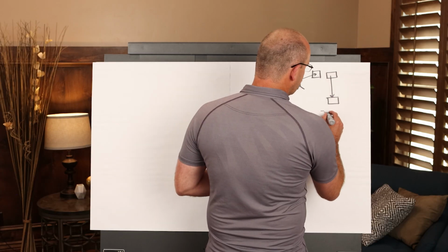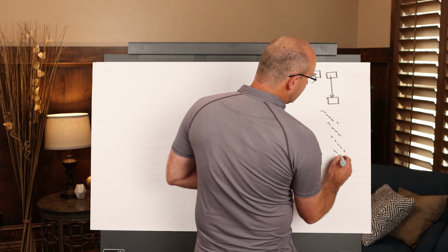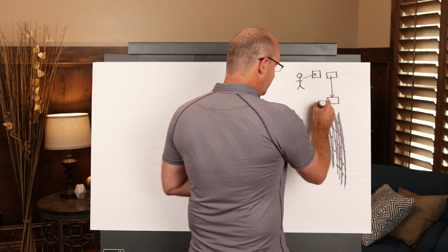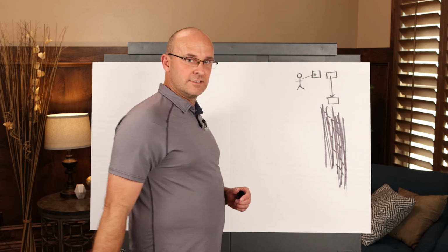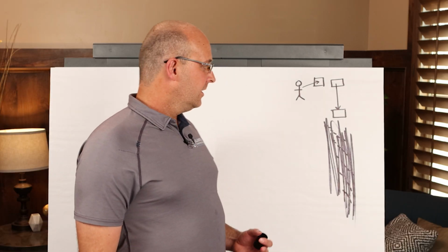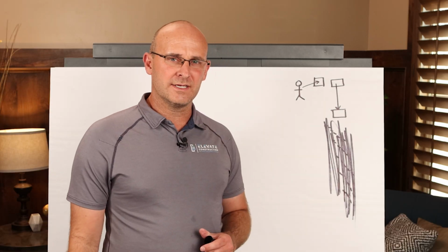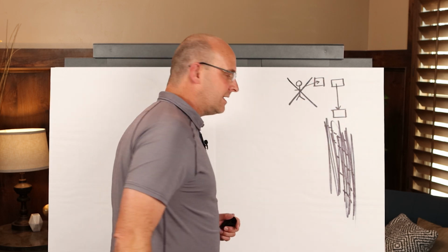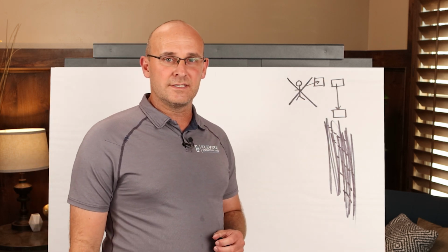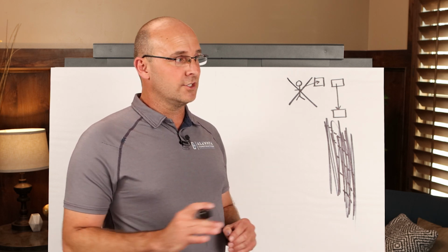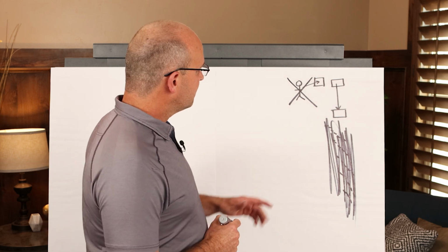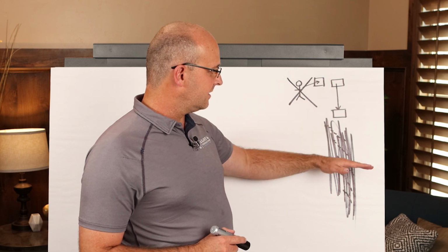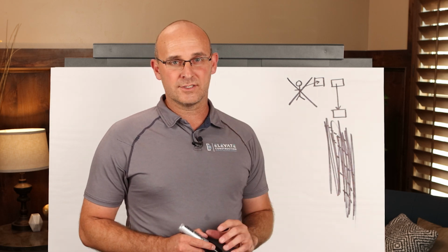When you have all these activities in a long CPM schedule, if you tie in the logic, it looks like this. The human brain is not capable enough to understand the logic behind a system like that. And so after about 5 pages, even the person that made it doesn't understand the system, let alone anyone else. No one else knows. So one of the biggest problems with CPM is it's created by one person who after 5 pages doesn't even know what's happening. No one else understands the logic.